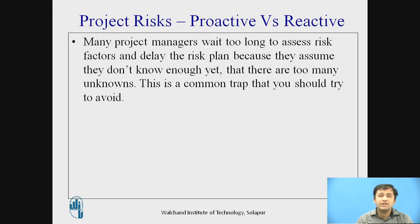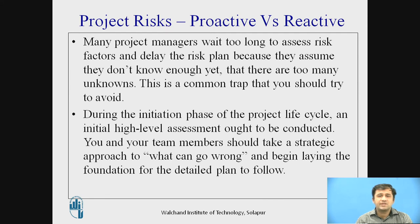Within the team and outside the team, we can have certain kinds of meetings. A brainstorming session should be done, which will help us jot down what risks are involved. Many times everything is going right and suddenly something happens that we have not planned for — sometimes due to ego issues or negligence, we do not involve outside persons or people from other teams. During the initiation phase of the project life cycle, an initial high-level assessment ought to be conducted. Your team members should take a strategic approach: what can go wrong? Cross-functional teams should be involved.